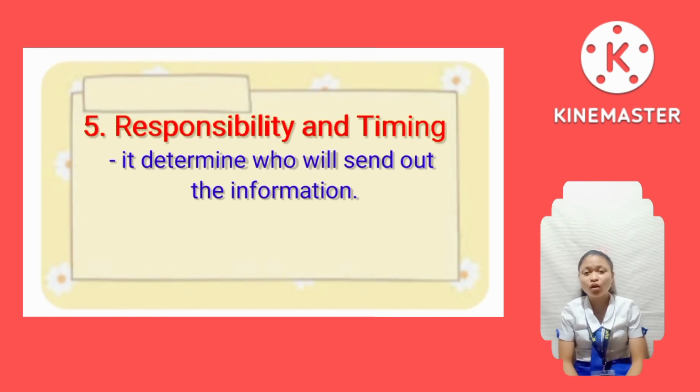It determines who will send out the information. For example, a common practice is to have secretaries of meetings forward the minutes or specific information to the appropriate stakeholders. In some cases, the responsibility lies with the project manager or project office. The timing and frequency of distribution should be appropriate to the information and need to be established.